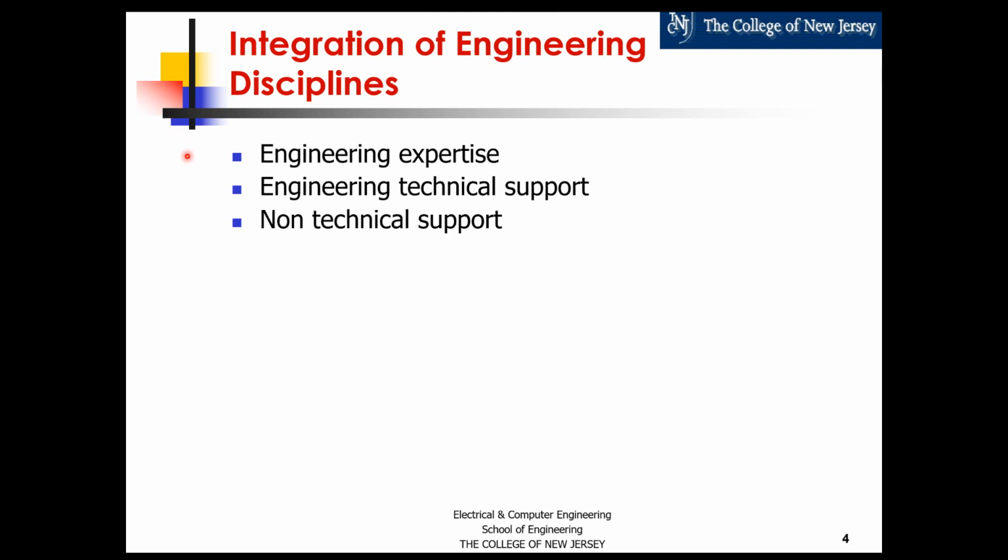So having visibility of what resources you need will allow you to assemble the team effectively, to hire, and to make decisions: if you don't have that type of expertise in-house, do you have to subcontract it? So it allows you to start looking at putting together the team early and setting yourself up for success as you actually finish designing the product and releasing it to manufacturing.